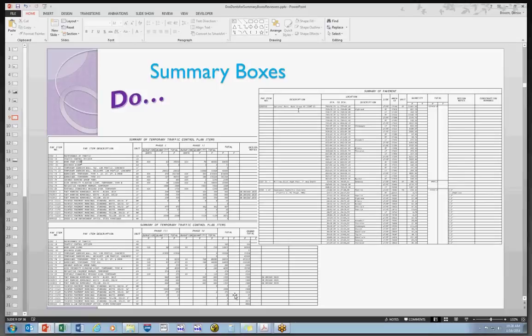A lot of times, though, they're not broken down by phases, and you take the total amount of paint and you multiply it times, you know, 2 or 3 lifts, and that's where your total comes from. If that's the case, leave all of this blank, come down here to the grand total, put the amount of paint in, and then just put in here based on 2 lifts or times 2 lifts or something to that effect, so that they know where that is coming from.